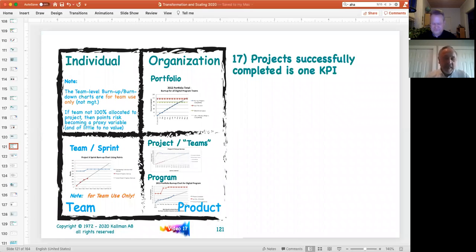So at the team level, going back, we had a program of, in one case, mechanical engineers, electrical engineers, optical engineers, and we actually showed them all on one Kanban board in a sprint format, and we measured those individual teams in terms of burn-up charts. We wanted to show progress, so we were burning up to show progress, rather than burn down. I love moving up, it makes more sense for a business. We showed those as team-only views. We kind of kept management away from those views because it wasn't relative to what typically managers are looking for.